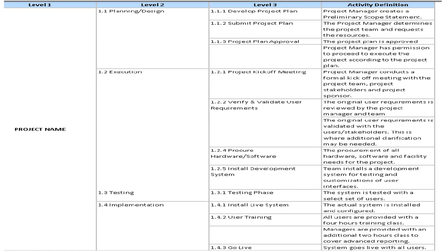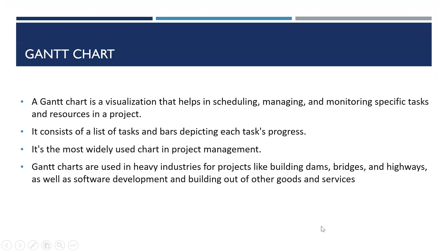Levels one, two, and three are identified during the formulation of the WBS. Level three, or the work package, is broken down into smaller activities. Now that we have developed the WBS and activity plan, we can create the Gantt chart. A Gantt chart is a commonly used graphical depiction of a project schedule — a type of bar chart showing the start and finish dates of project elements such as resources, planning, and dependencies.